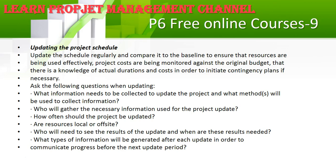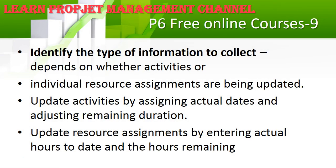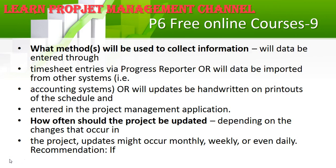You need a procedure and process for how you'll collect information — who gathers it, what template you use, and how to get feedback easily from everyone. You need to identify the activities' start and finish dates, resources, and time sheets for equipment and personnel if your company uses them. If your project uses time sheet modules or ties into accounting systems for cost, let me know and I'll give lectures on how to do that in P6.